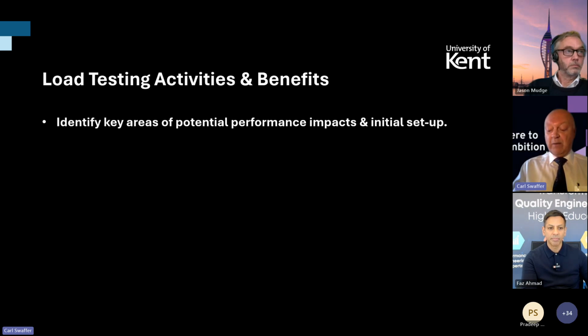during the clearing period. Since this was our first collaboration, we also had to complete appropriate documentation, contracts, statements of works, statutory liabilities such as DPIA, data processing agreements, etc., as well as configuring our infrastructure to allow temporary external access through our security layers to our load testing environment. Much of this configuration work has now been documented and scripted, effectively reducing the workload to prepare for subsequent load testing in future.